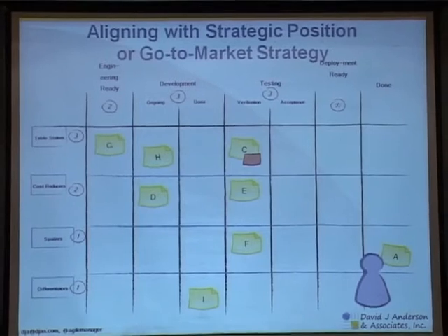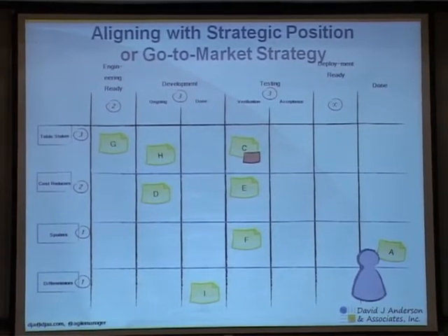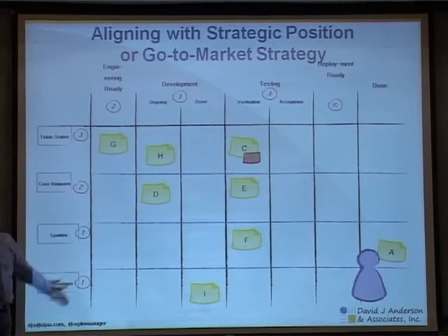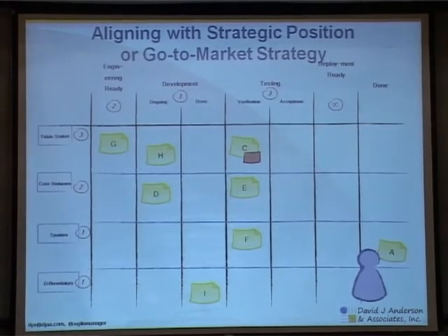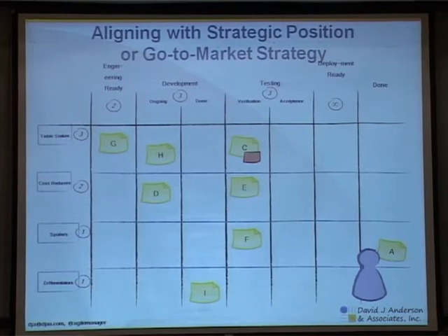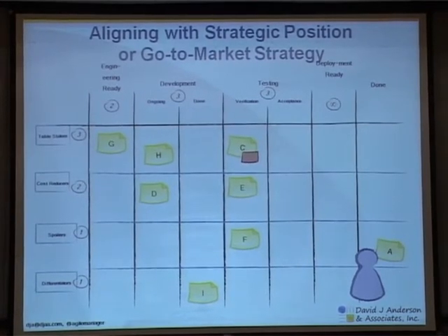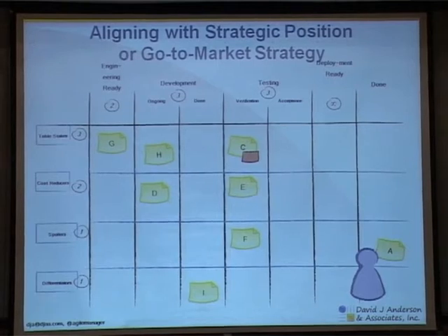And you can start to hedge that risk by visualizing how much of each type we are carrying in inventory at any given time. These items have a different cost of change. The differentiators will have a higher discard rate. Table stakes, very low discard rate. Should be 0 if you're doing it correctly.